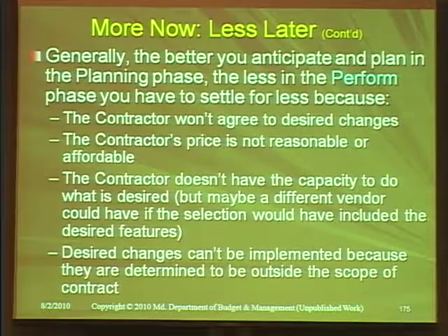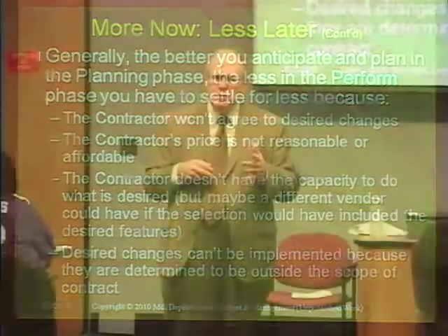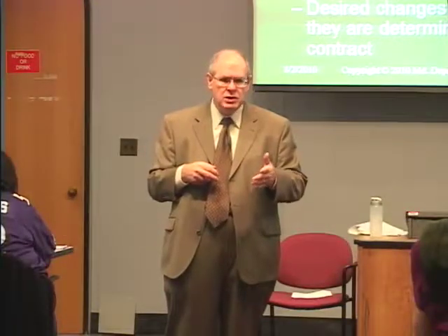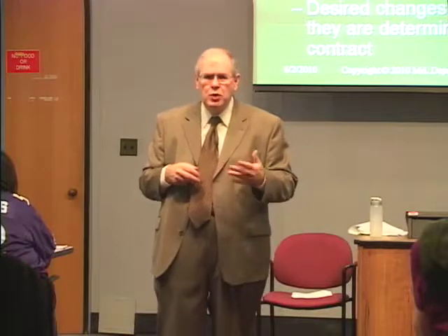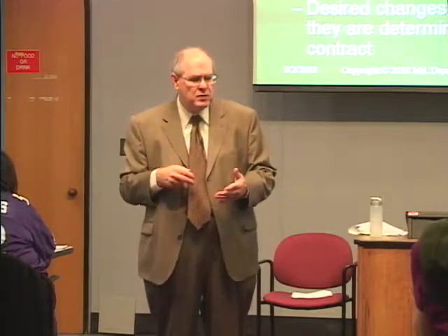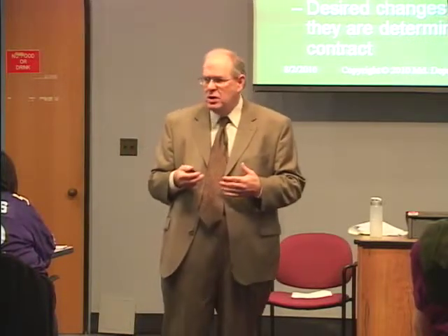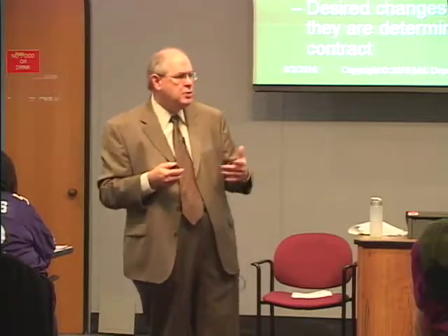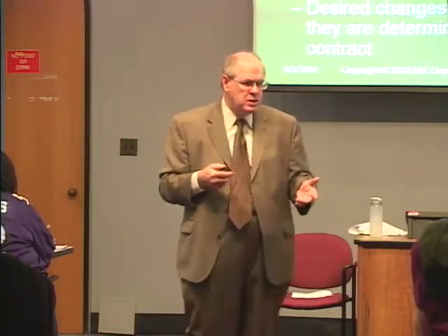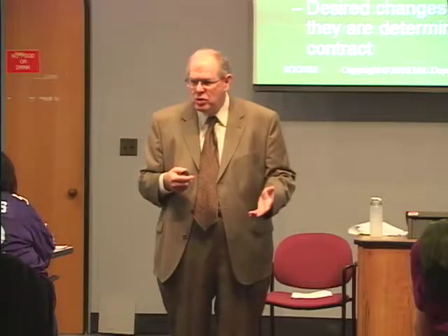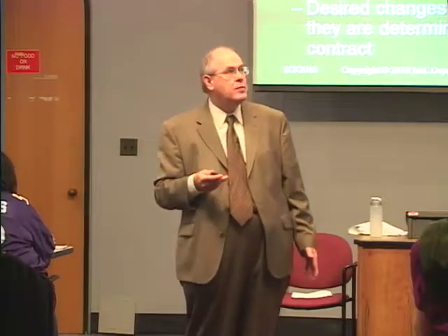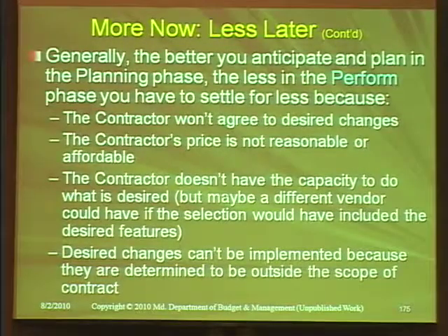Again, continuing in perform. And some of the issue I looked at yesterday, that sometimes if you don't have something in a contract or in specifications, and when you're having a contract being performed, you find out that your vendor and you have differing interpretation of what is required to be performed, sometimes you can get what your interpretation is, and sometimes you can get it only with paying more money, and sometimes you can't get it at all. So these are the things that good planning up front may help prevent when you're in contract management.